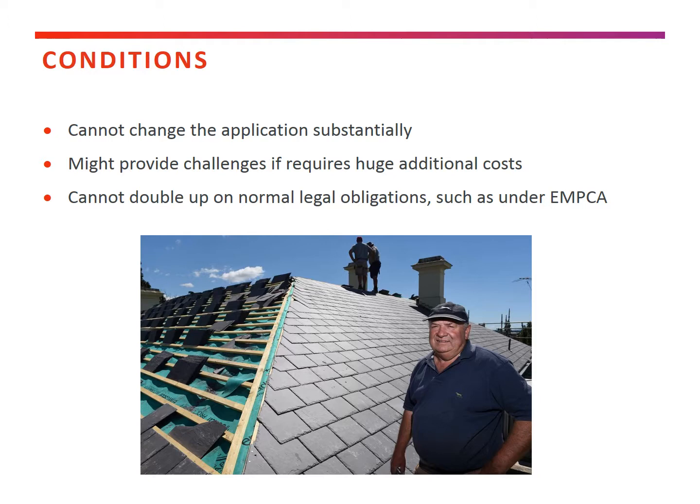It's then back in the court of the applicant to either take that on board and alter the application, but you can't make it a condition that substantially changes the application, particularly in the case of something like the slate roof, where it's really expensive. You can't do something that will fundamentally change the application. So the proponent might choose to alter it, and if it's already been advertised, then re-advertise the application, which in the case of the City of Hobart is another $250.